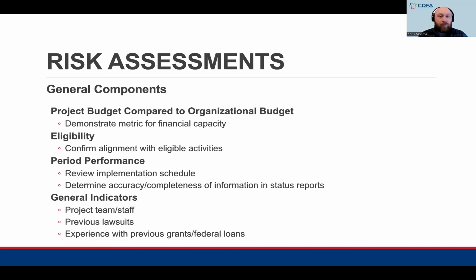Period of performance, which is reviewing the implementation schedule and determining accuracy and completeness of information and status reports. So the first round of status reports were recently due. So we'll be checking those. We'll be checking the original implementation schedules provided in the application to make sure that they all align with the deadlines under this grant and loan program.